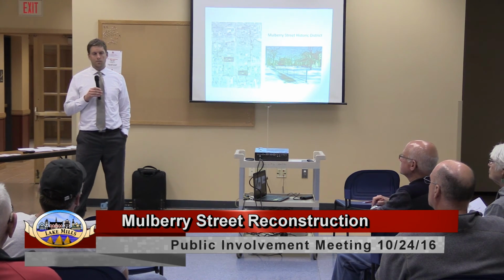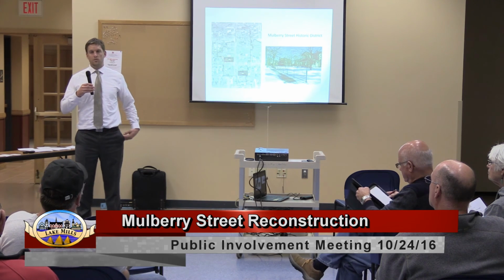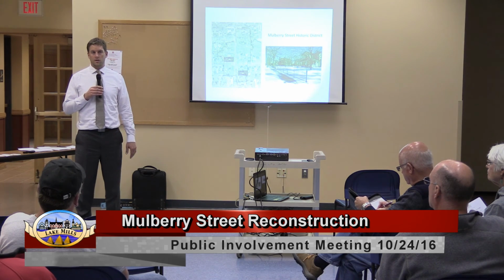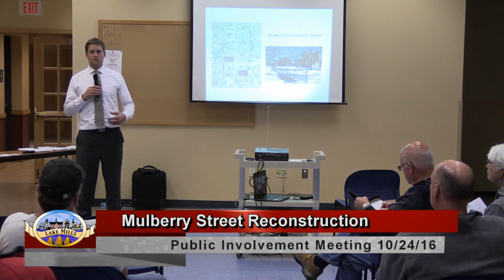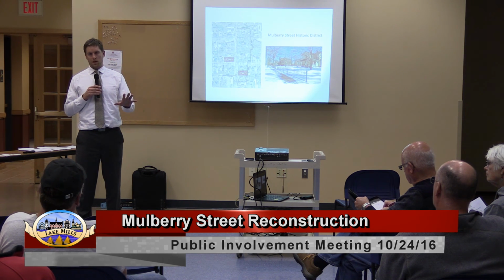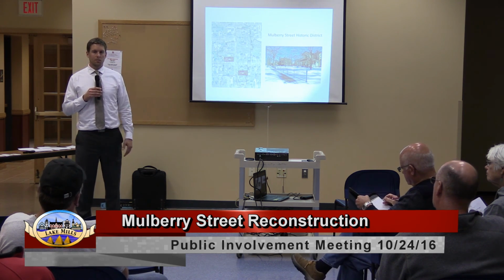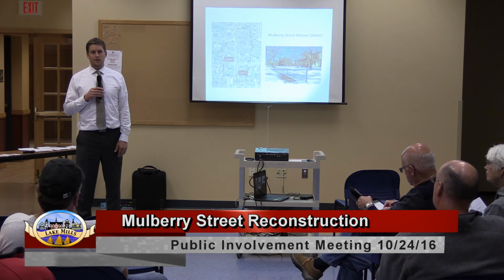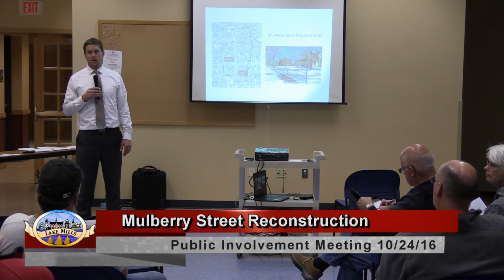I would also add that sometimes with these projects, homeowners would like to replace their driveway, concrete, or asphalt. If you wanted to replace your non-lead service, your sanitary service for instance, that's negotiated on a homeowner basis with the contractor. The city doesn't get involved and doesn't pay for any of those things because it's behind the property line, but it's often less expensive to do it in concurrence with the project. They're already there, so you get the benefit of large quantity pricing for concrete and things like that. So just keep in mind that if you're thinking about it, it might be worth doing.